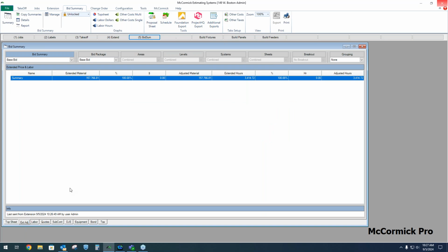This is where we assign rates to the hours, add additional job expenses and markups. But you'll see I can make adjustments here. And again, I could do it by percentage. So I could have done it here, and I could have said, well, that's material cost. Let's go to hours. So I could have done 0.8, so 80% here, it'll show the difference. It'll show here's the extended hours. We just want to do 80. There we go.